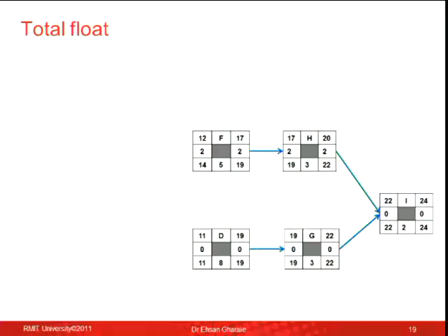Yes? And exactly on question 1 and question 2, you had an activity that had a critical start, for example. Critical start means 0 flexibility. So it is possible to have different floats for starts and finishes. It means it has to start on time, but you've got some flexibility for finishing it. Yes. Remember, this is a plan. When you go into reality, you have to always control and monitor.